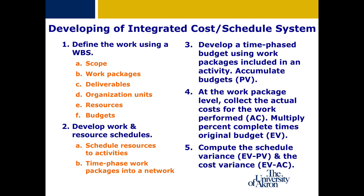There is a five-step process to develop a time-phase project budget plan and project monitoring process. The first step is defining tasks necessary to complete the project by developing a work breakdown structure. This is followed by developing a work and resource schedule, where you time-phase work packages by assigning resources with costs associated with their work for particular tasks. All this helps define the plan value for the project — the project baseline — provided in monetary terms, for example a plan value of $40,000 for a specific project.